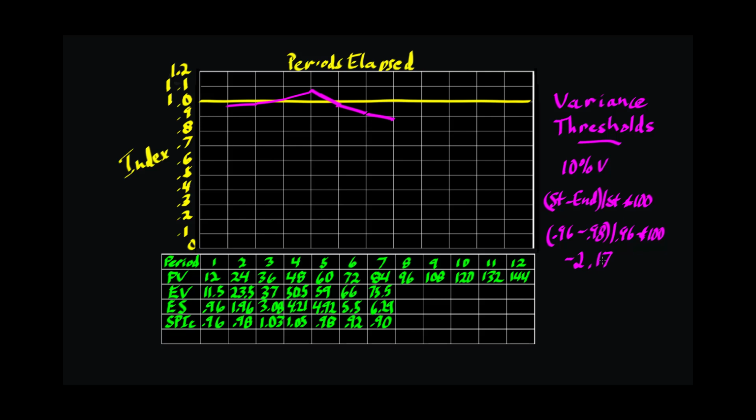Performing the calculations for the remaining periods, we get minus 4.96, minus 2.36, and then it goes positive 6.53, 6.78, and 1.95. Negatives indicate increases from period to period. Positives indicate decreases from period to period.